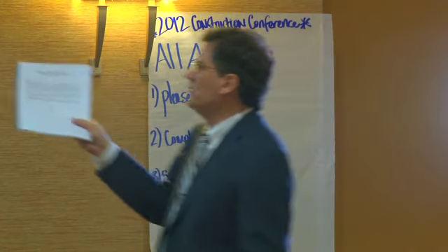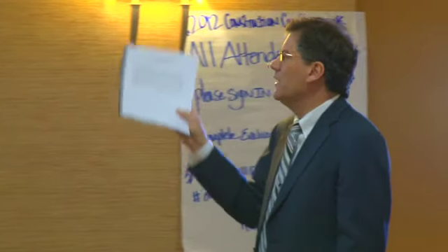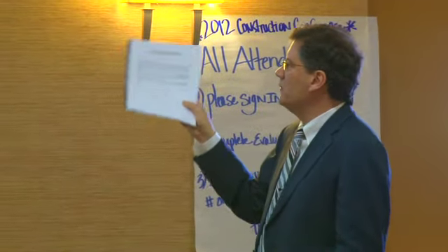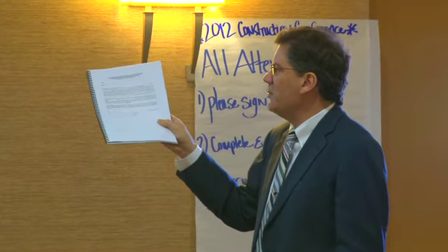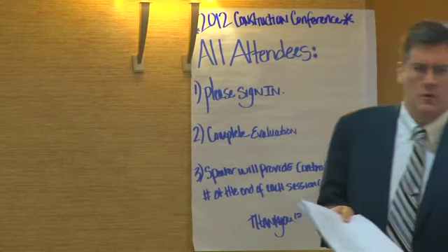Now, notice this block down at the bottom. The document waives rights unconditionally and states that you have been paid for giving up those rights. This document is enforceable against you if you sign it, even if you have not been paid. If you have not been paid, use a conditional release form.